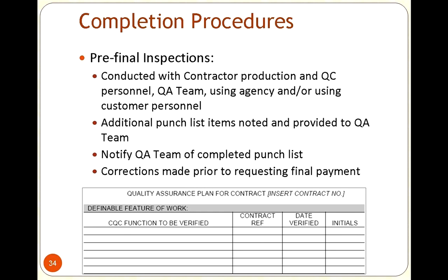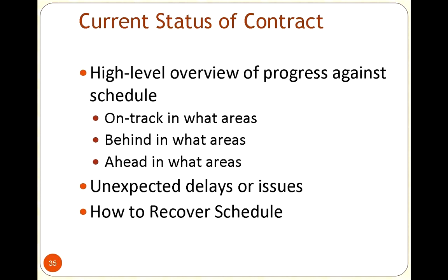I know that was something I had to do many times with the contractors. I would say, I'm not cutting you a check until I get verification that everything has been completed. And that guy and I would go round and round. It's been done. It's been done. I'm sure it has, but my quality control guy has not verified it. I'm not cutting the check until he gives the green light. When he gives the green light, I'll sign the check. But until then, I'm sorry, I can't take your word for it. Sometimes it gets that nasty, but sometimes that's very necessary to make sure you're not stuck with a bum product. You never want to be stuck with a bum product.